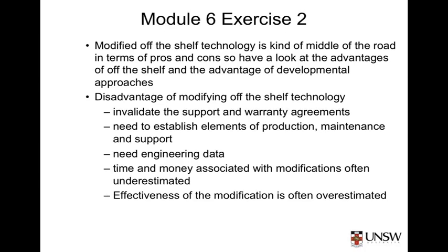By modifying a commercial item, you probably invalidate the support agreements and the warranty agreements that came with that off-the-shelf item. You will probably need to establish production, maintenance, and support for the elements of the design that you're modifying. You may have some trouble sourcing the engineering data for the off-the-shelf item that you need in order to design and implement the modification. And in my experience, people generally grossly underestimate the time and money associated with the modification and grossly overestimate how effective the modified item will be in meeting their requirements.